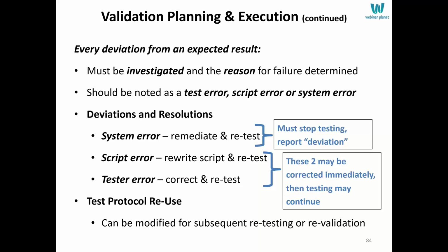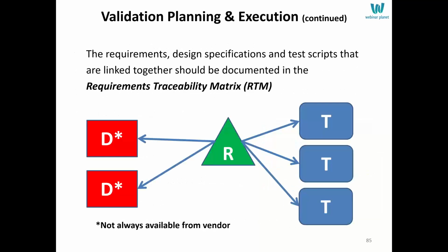Now, if that has to go back to the vendor to fix, and they're going to recompile the code and issue it, you may have to start over with installation qualification and operational qualification again, start from the beginning. You also note that your protocols are documents that can be reused. You can amend them, you can make copies and use them for different projects, but they're reusable.